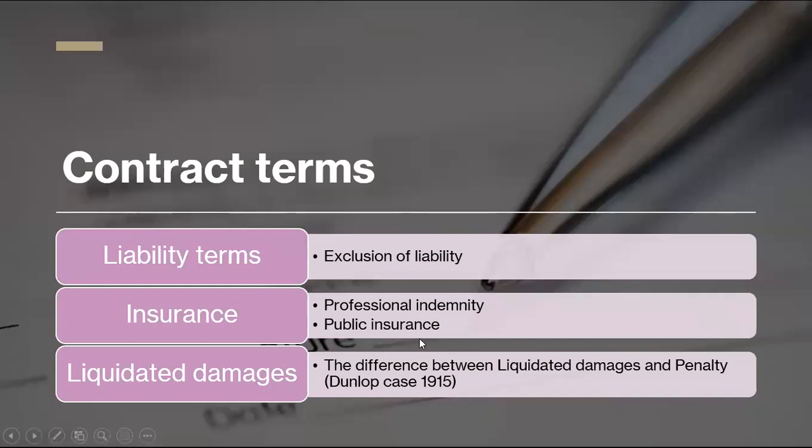Remember that currently there is case law that overrules this principle, but CIPS still applies the old rules. So we only need to remember that a penalty is exceeding, and liquidated damage is a true estimate of possible loss. That is the most substantial difference.